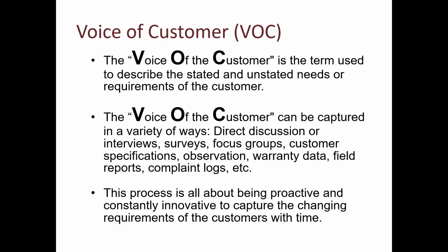This will help me in two things. First, satisfy them. Second, it could be, as I said, a source of Six Sigma projects once validated with the business. Not that anyone will just complain and I will go and open a project. No, I didn't say this. I'm stressing, this should be validated with the business first. If it's validated, good. We can open a Six Sigma project on it. This is the importance of VOC, or simply voice of customer.